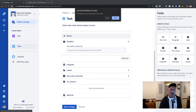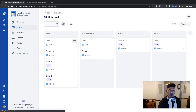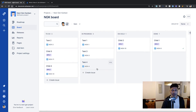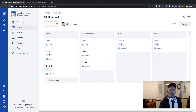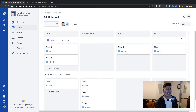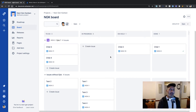Let's go back to the board and talk about a few other things you still cannot do. When you are working on the Next Gen Project board and moving cards from one column to another, you may want to have swim lanes. Right now there is no option to create a custom swim lane. However, there is an option to do grouping based on the assignee, based on the epic, or based on subtasks. It is quite good, but it is not really similar to agile-based projects where you can have swim lanes based on your own custom query.